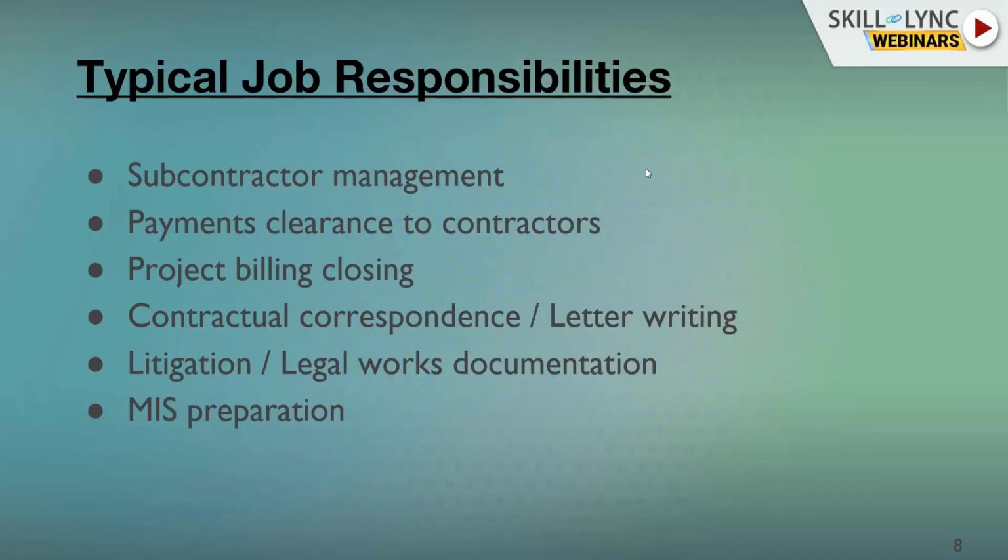Next is project billing closing. All contractors will submit their bills. The final bills have to be closed from the project controller's point of view, so that the project is closed. So full and final billing has to be done. That is a more important responsibility, because there will be variations, there will be quality issues, safety issues, and those have to be settled, and then project closing has to be done.